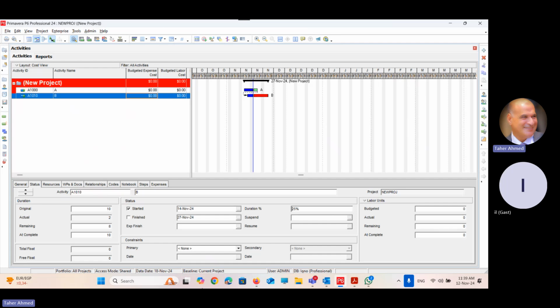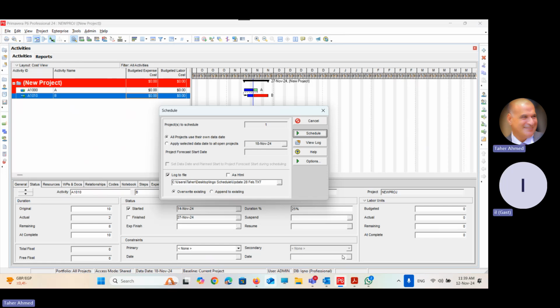Now it was completed on 27th of November. It means that it accelerates the work, or let's say makes a better view for the project than the other option. My point is, what we agreed about, we have to apply. If you want to change it, submit a change request, and let us agree together about it before taking the action of changing the option. Is it clear? Okay.